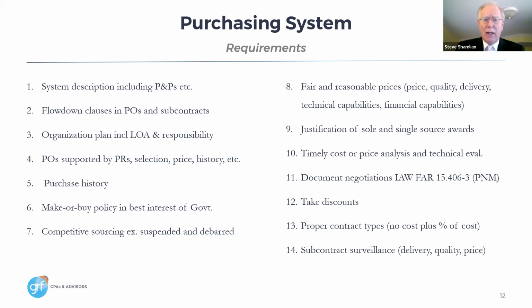Something important here on item 11. That's performing post-negotiation memorandums, and the P&M should document your negotiations with your subcontractor. It's doing exactly what the government would do when documenting its negotiations with you.